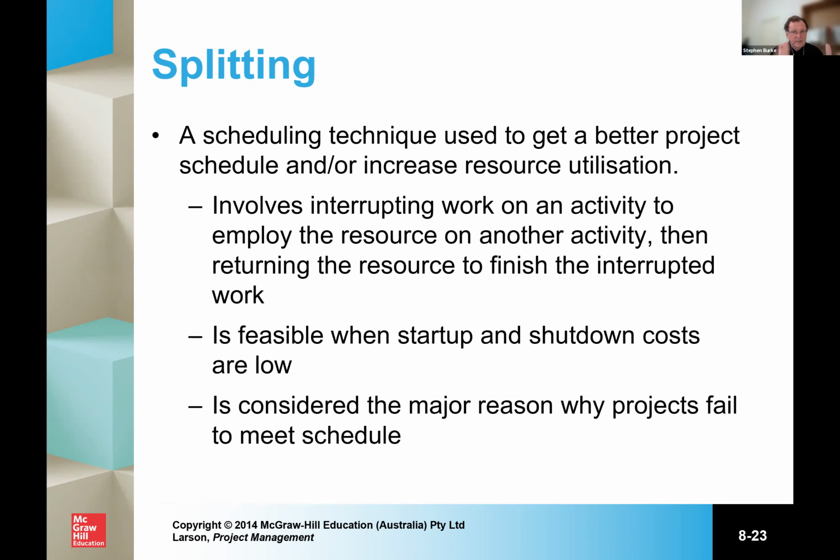It could be nurses looking after patients. It could be engineers looking after a project. It could be people in the kitchen cooking food. Same thing. It's feasible when your startup and shutdown costs are low. But if you have to reprogram equipment, reorientate staff, certify them with some type of competence or certification, it becomes a real issue.